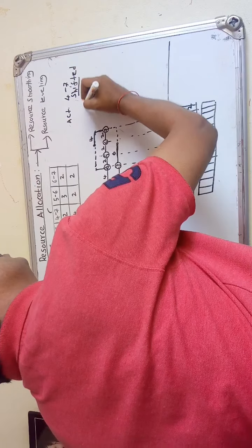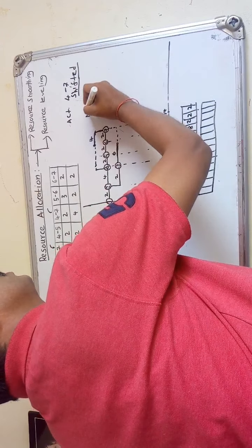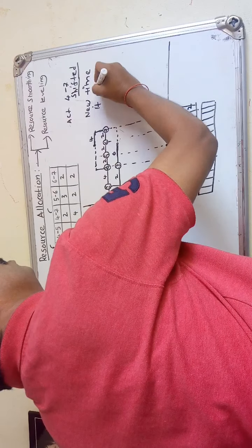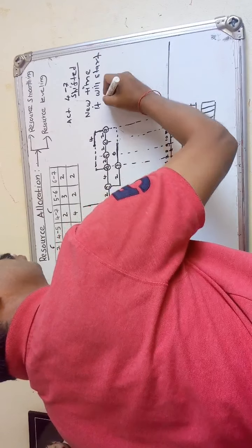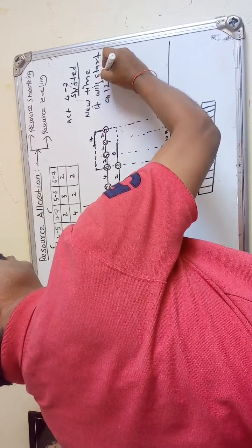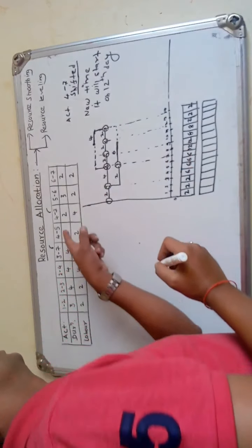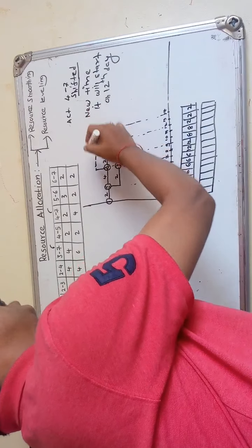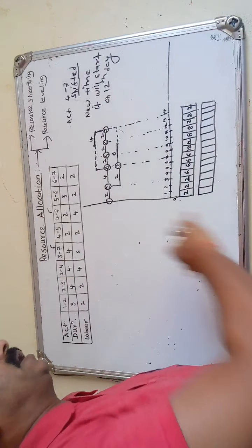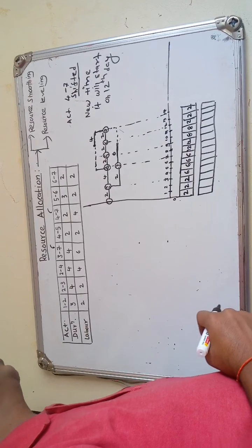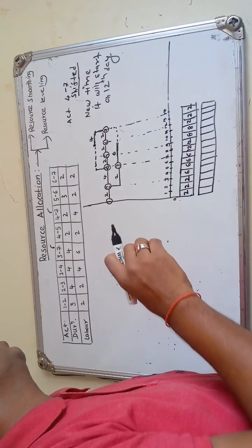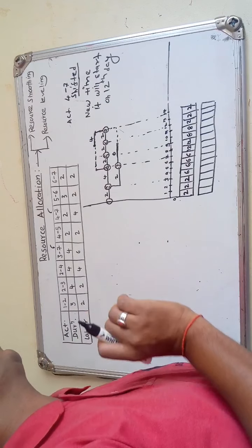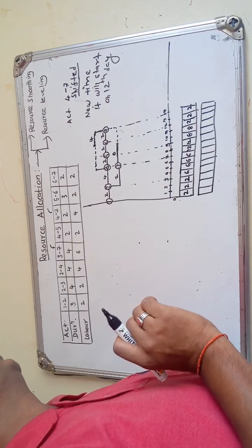New start time: it will start on the 12th day. As it requires 2 days only, it will end on the 14th day. So the manpower requirement also gets shifted to the particular day. Now you find out the labor required per day. So we have done the smoothing. We have only used the float of 4 to 7 wisely, or intelligently. Work out, find out this particular.